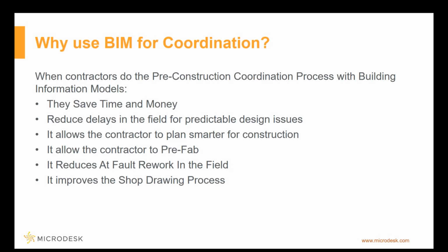So this reduces the rework in the field because we're resolving all these coordination issues, and as long as everyone follows the construction coordination design in the field, everything goes smoothly. And this BIM coordination process also improves the shop drawing process. You're no longer just taking the CAD from design and only analyzing it in 2D. You're getting that fully coordinated 3D model to then produce the shop drawings from.